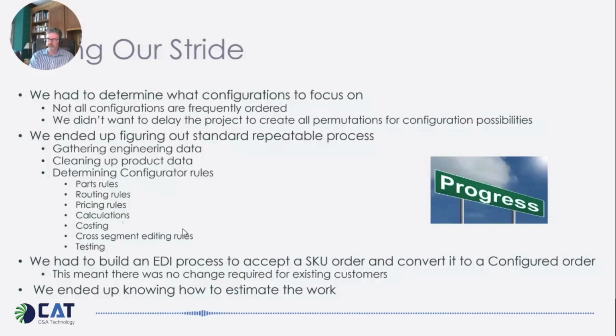At Medeco, they have a catalog that has, like I said, probably 50 different product lines. Before we went live, we were working on the most popular product lines and left the lower volume product lines towards the end, which actually spilled over into after go live. There were some product lines we were still doing as SKUs. Most of the stuff was coming through as configurator, and over time they worked out the last bit of them.